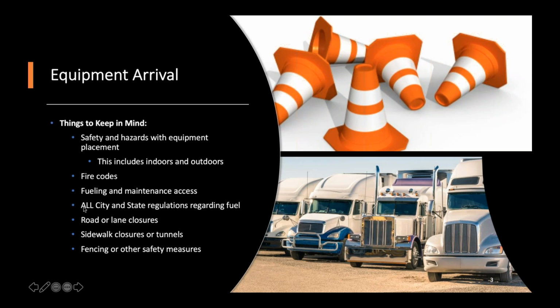Road or lane closures or sidewalk closures, you have to worry about all that, because there may be city codes that will keep you from blocking a road or blocking one lane of the road, or maybe even parking spaces. In some areas, you just have to go to the city codes department.